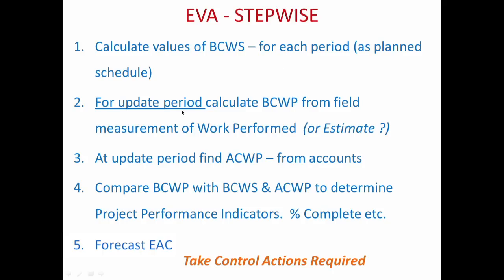Then for each update period, calculate BCWP by taking field measurement of work performed and multiplying by the unit rate — the ideal way. Where that cannot be done, it may be through an estimate of percentage complete. Ultimately, percentage complete can be estimated or obtained by measuring actual work performed divided by total work at the activity level.